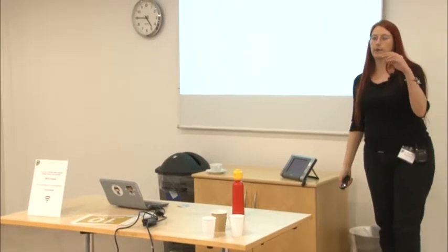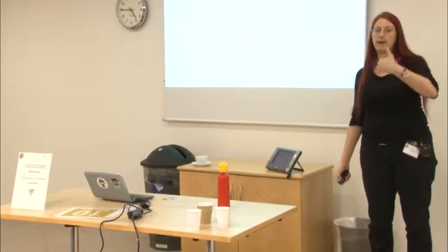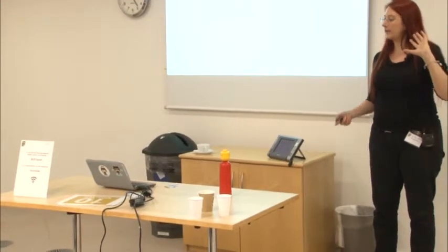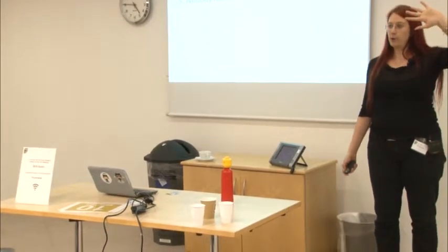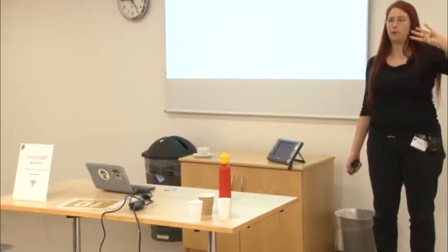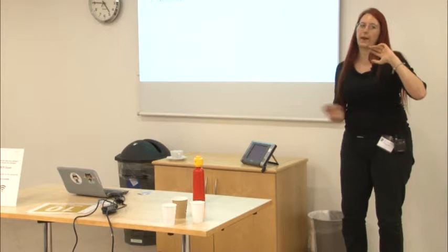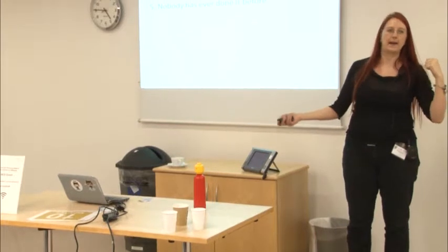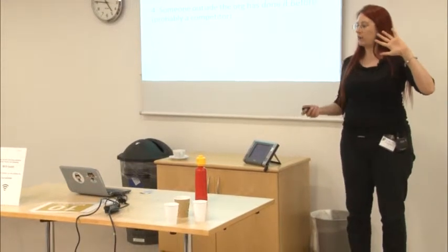This is how I actually get people to estimate it, and it's a really simple scale. It's also pretty objective rather than subjective, because it's not dependent on what you think, it's what the world thinks. And if you don't know, treat it as complex. So, 5: nobody's ever done it before. You're looking at a problem that has not been solved, and it might be that it hasn't been solved in this context. We want to do this quicker than anybody else, more effectively than anybody else, at a bigger scale than anybody's done it before. Whatever the newest aspect is, it's usually either a 5 or a 4.